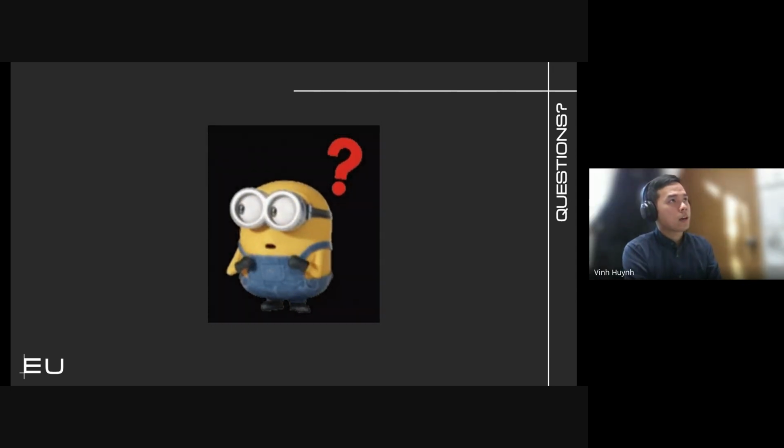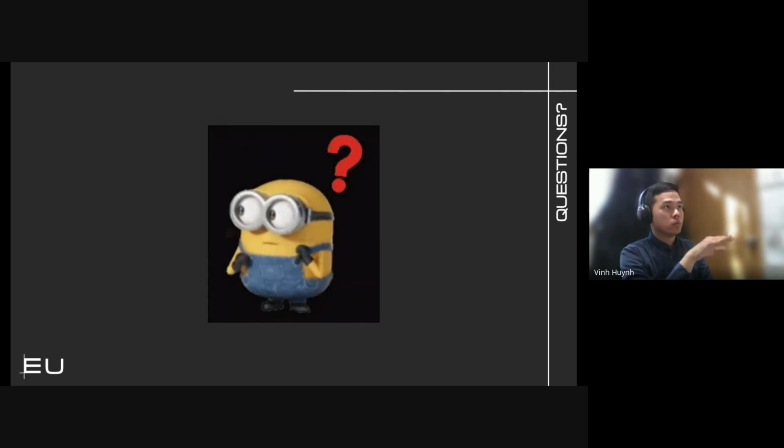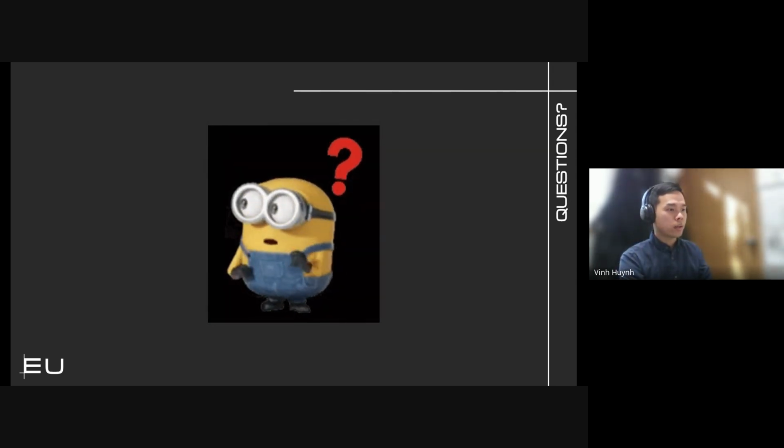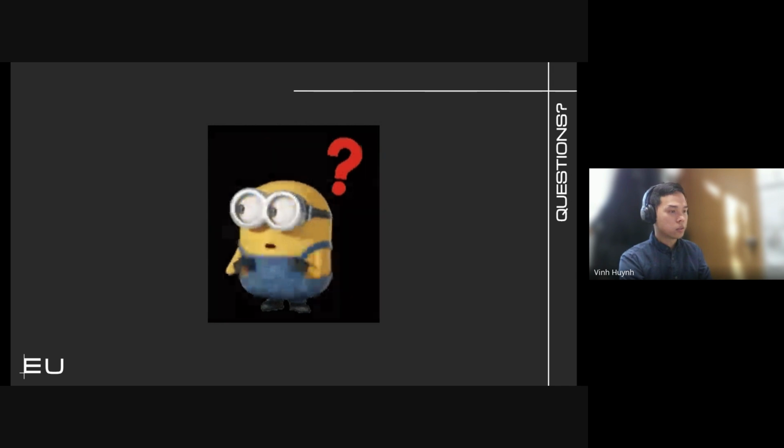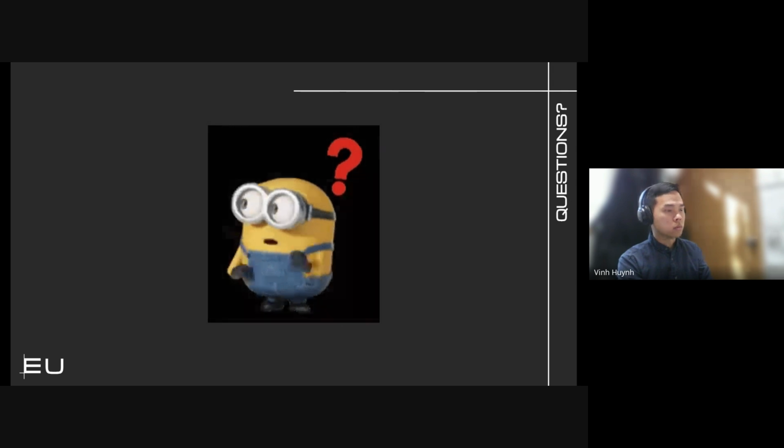So this step, just like how we normally would submit on Procore, we try to send it out to as many relevant consultants as we can. If we miss one or two consultants, it's still the coordinating architect consultant's job to pick that out, send it to them and coordinate it. Once in a while they will email us, hey, can you please add consultant A, B, C to this? Adding a new user onto the session, you can do that directly from Bluebeam instead of from Procore. Usually we add them on Bluebeam and then we go to Procore to add them in to match.